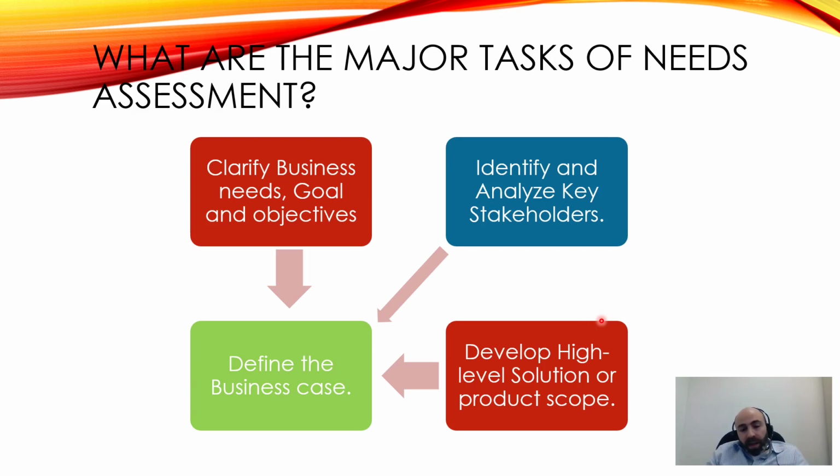Okay? And all of these three major tasks yield the business case definition, a strong definition or a solid defined business case. That is when the idea or the initiative becomes a project, once we have defined a business case and have gotten sign-off authority from the sponsor on that business case.